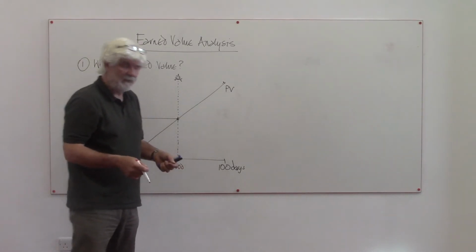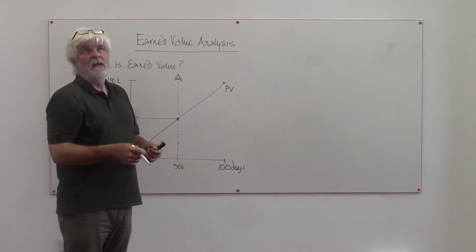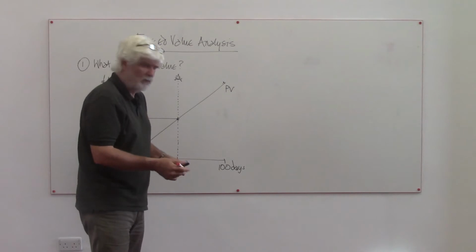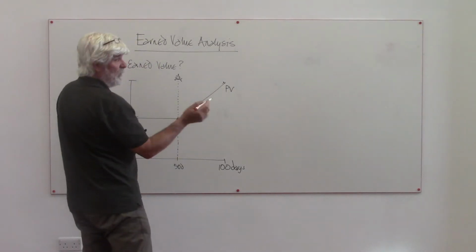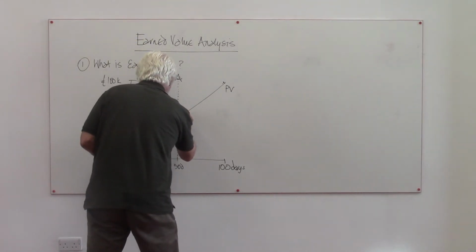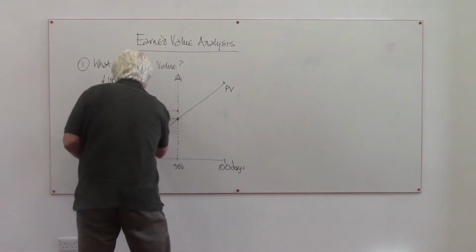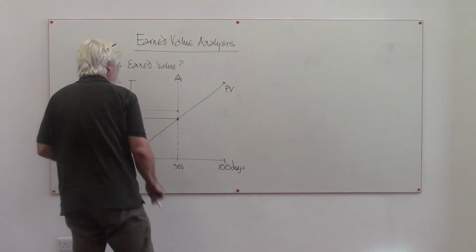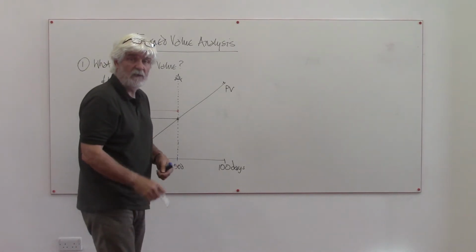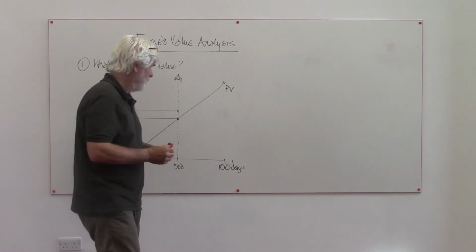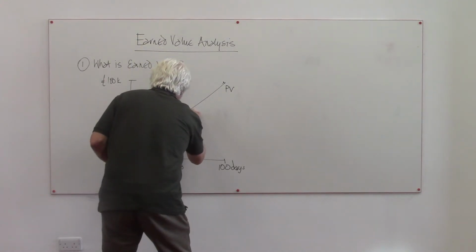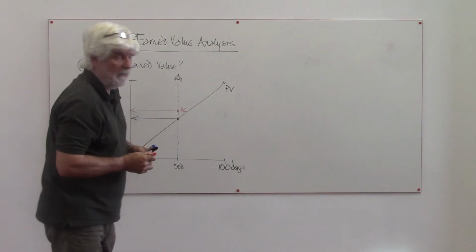How much have we actually spent? Let's say we've had a look at the invoices, we've had a look at all the accrued costs, what we owe anybody. We've tallied that up. Let's say that's £60,000. All right with that? So that's what we've actually spent so far, £60,000. That's called the actual cost, or the actual expenditure.